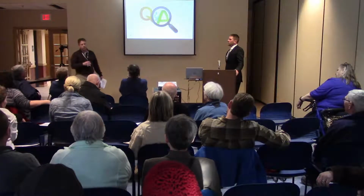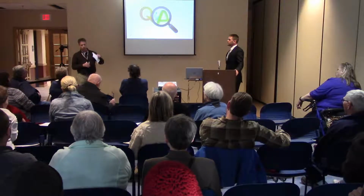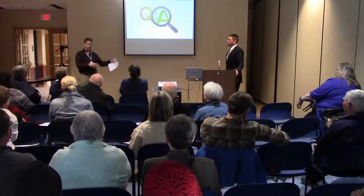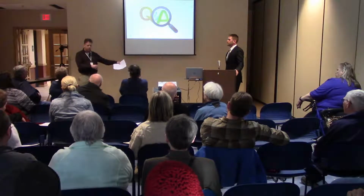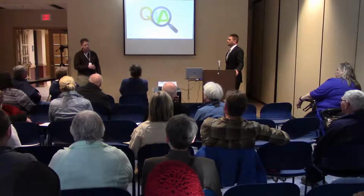What we're trying to do here is, so I talked about the thing that we are going to do, which is we're going to let the project earlier, so hopefully catch more contractors when they're hungry, looking for the work. So rather than March like we had the last time, we're going to be in November, before the end of the year. So that's one thing that we're hoping is going to increase bidability.